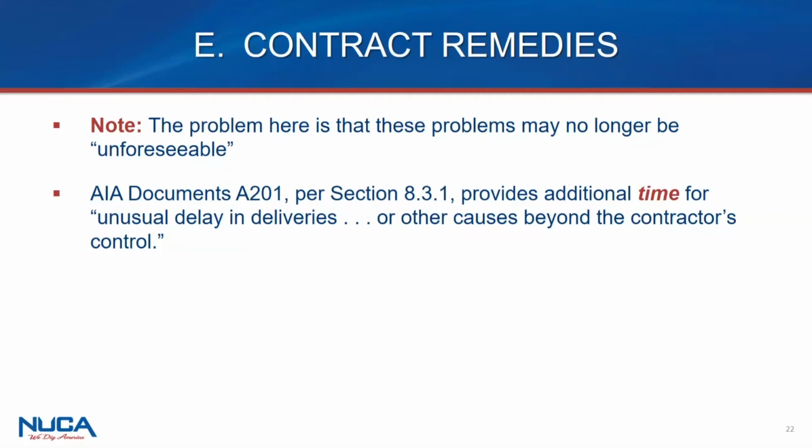Again, they're saying you're going to waive compensation for the additional time, I guess the theory being that you can demobilize and save on all your costs, which is not a very practical answer in the real world. But nonetheless, you have to play the contract terms as they're written. If I say your only remedy for anything is time, you ask for time and it gets denied, guess what I'm coming back for? I'm coming back for money.